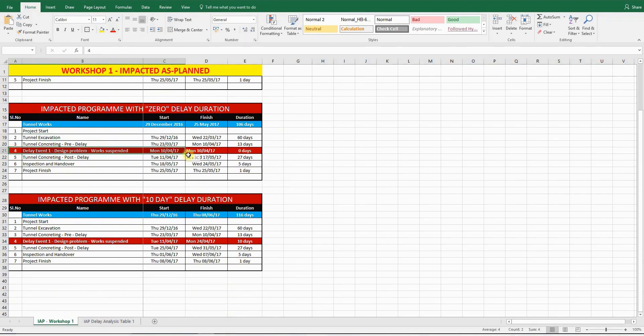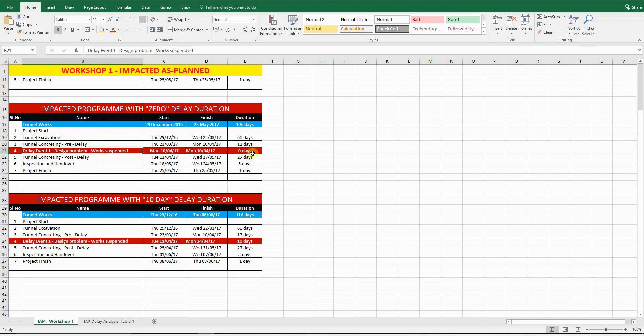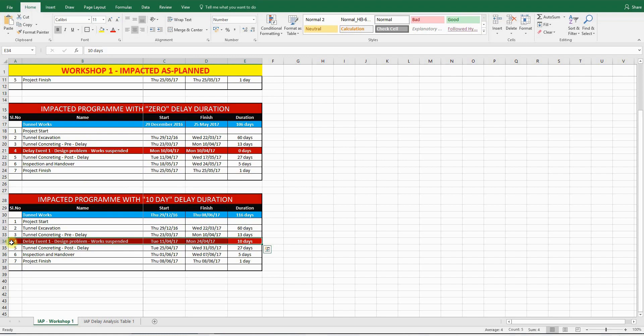So this is the delay event which took place. Activity ID number 4, delay event number 1. There's a design problem. Obviously, it is caused by the client. The works are suspended. It's actually suspended for 10 days, but there are a couple of steps to be followed while doing the impact analysis.